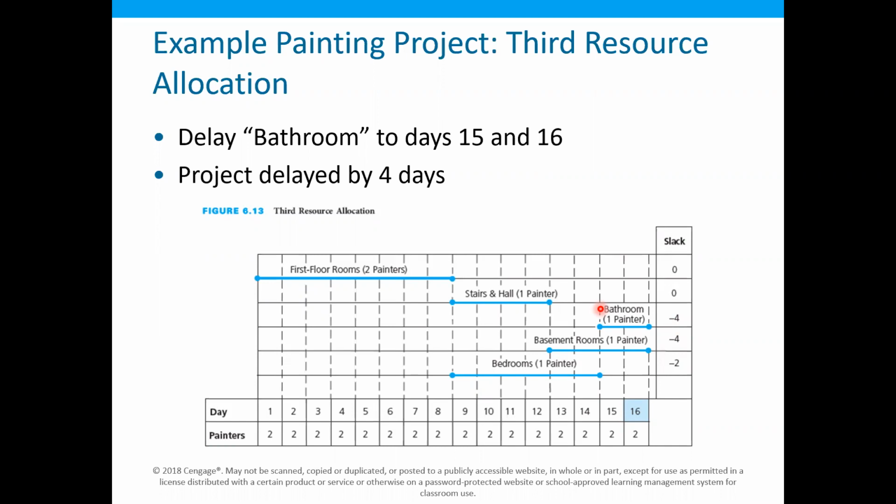First of all, we will schedule those activities, that means we don't change those activities, which have the minimum slack. If there are 2 or more activities having the same minimum slack, we will choose the activity with the smallest duration. If there are still 2 or more activities having the same smallest duration, we will choose the activity which has the lowest serial number in this project.